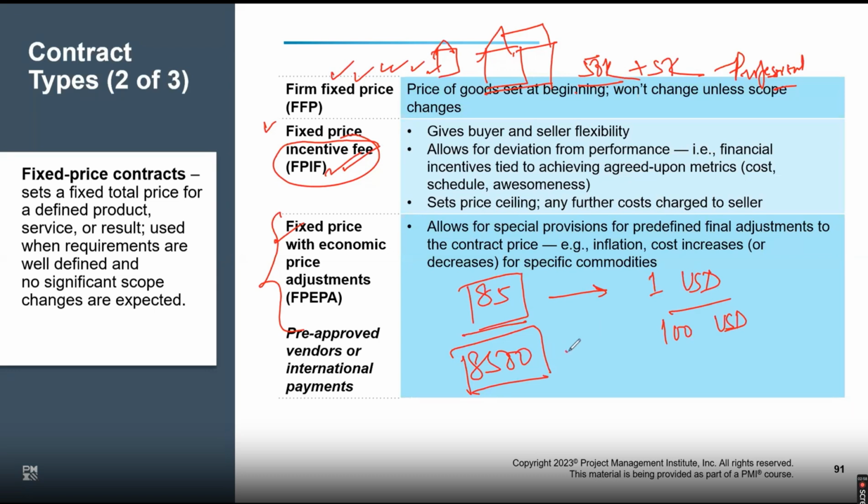So in the end, my customer should not be penalized, should not be paying more than 100 USD, and I should not be getting more than 8,500. If there's a global disruption, we will try to adjust and bring it back to this same equation, going back to the original pricing model. So it will adjust, a fail-safe.